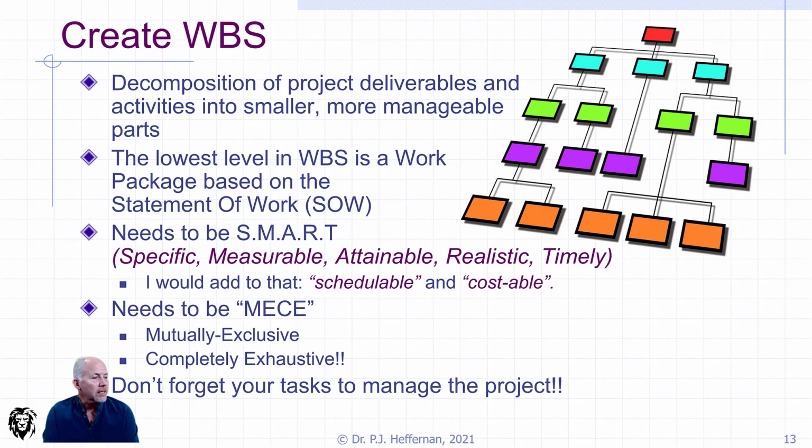So I came across a term not so long ago, that it needs to be MECE. And of course, that's two words, mutually exclusive. Absolutely, they all have to stand alone. If a work package is still overlapping with other work packages, then it becomes really complicated as far as scheduling and everything else goes. So mutually exclusive is not a bad way to test to see if you've got the refinement in your work breakdown structure that you need.